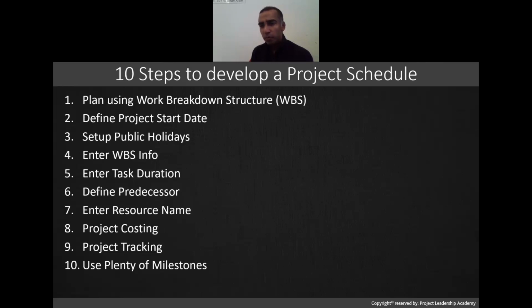So what we do is we create milestones by imposing certain deadlines. End of this month, for example. So at the end of this month, these are the things that I need to get done or completed. Approvals must be completed, right? So the sign off by the sponsor must be done by this month, right? And then next month, what are the things that need to be achieved?